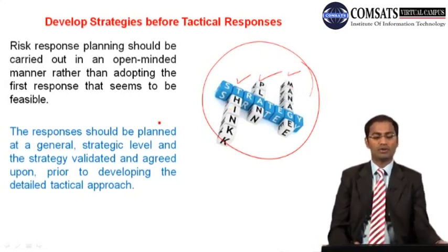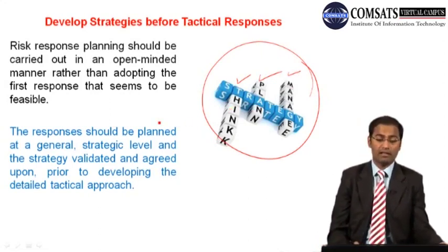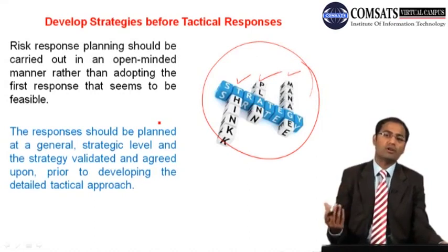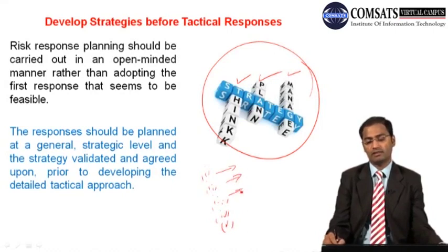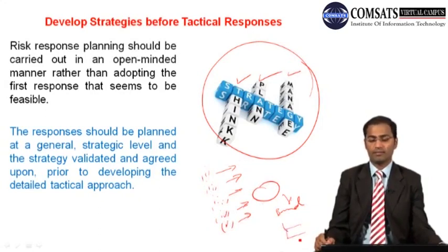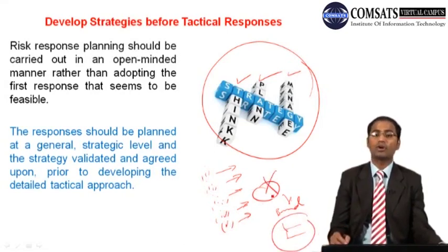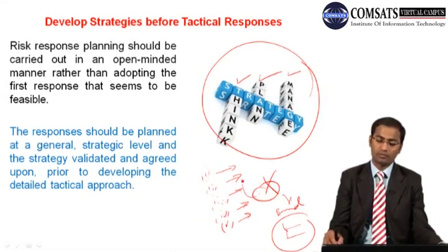So risk response planning should be carried out in an open-minded manner rather than adopting the first response that seems to be feasible. Jo pehla response aaya, aap usko na karein. Be creative. List down a few options: 1, 2, 3, 4, 5. Have some advantages, disadvantages, SWOT analysis. And then choose something based on some assumptions and some constraints. And if these assumptions and constraints turn out to be invalid, then this is not the right choice. So select another response then.